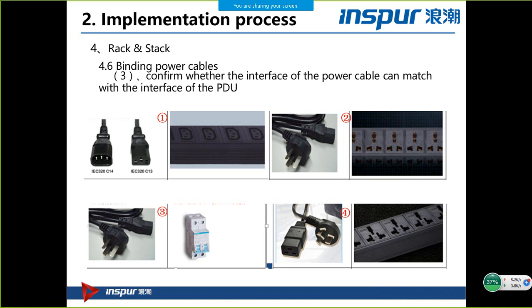And here is to confirm whether the interface of the power cable can match with the interface of the PDU. Actually, for this part, our project manager will confirm with our customer's on-site tech in advance. And when you go on site, you also need to confirm this part just in case.